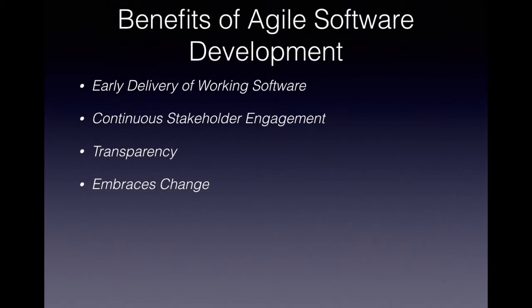The fourth benefit is that agile software development embraces change. It doesn't matter which methodology you follow — Scrum or Kanban — agile embraces change. This is unlike traditional methodologies like Waterfall, where change was considered high-cost because all requirements needed to be locked down before progressing to design and development. In agile, you have a small set of requirements in a product backlog and the product manager can re-prioritize the backlog as sprints are ongoing.